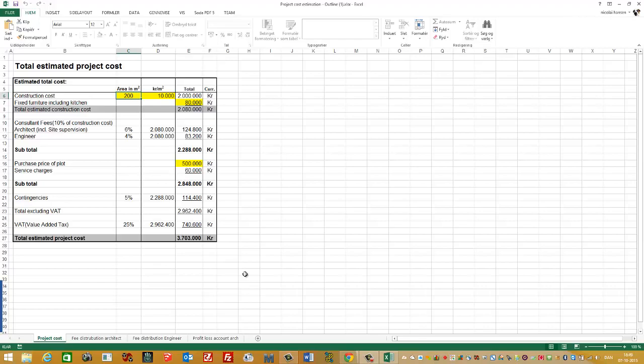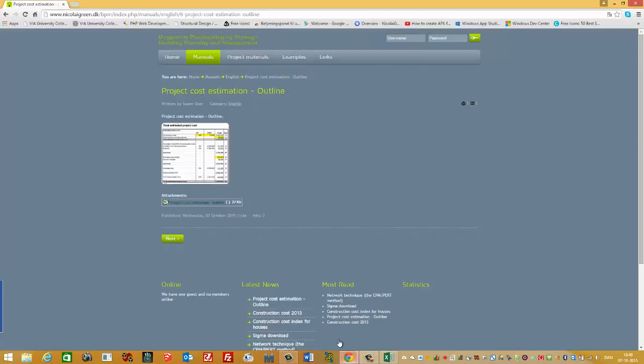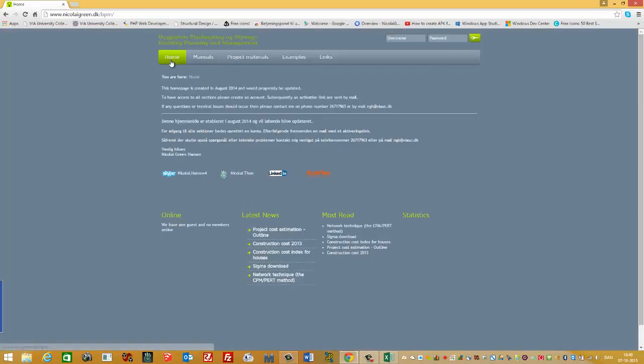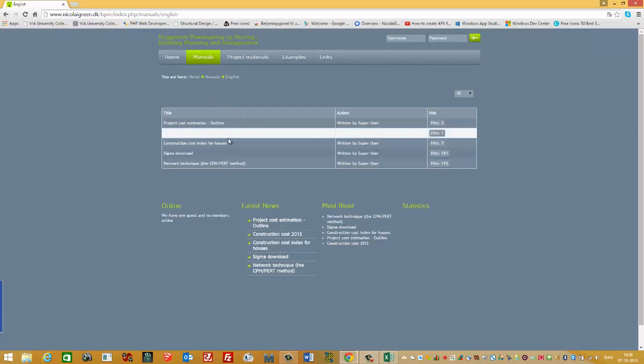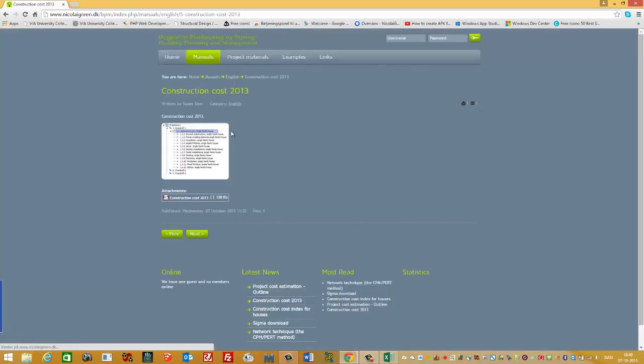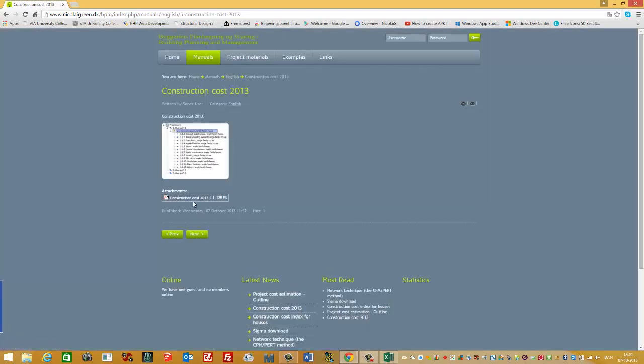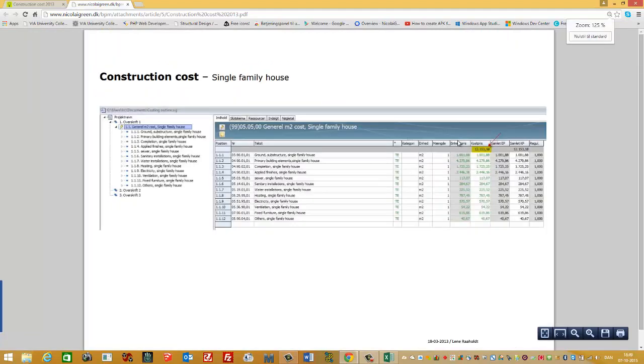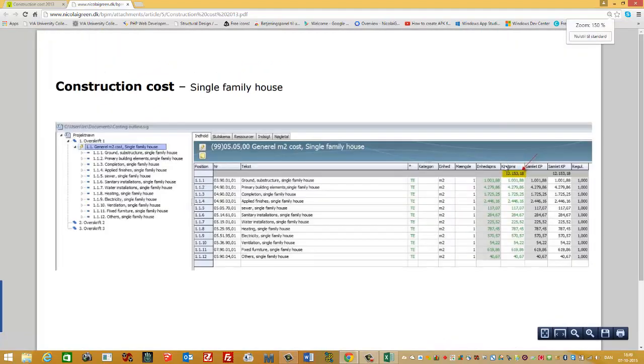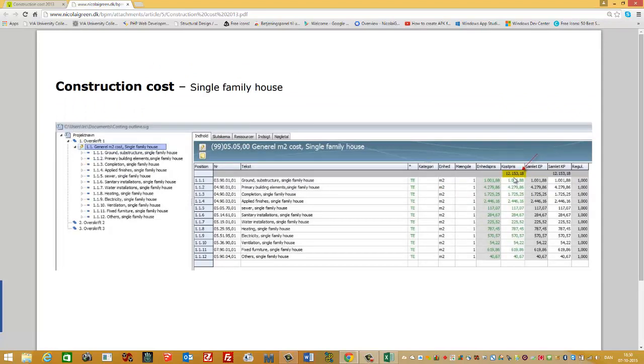Then I go to the website again, to Manuals, English. And here you can see it says Construction Cost 2013. It's a PDF file. Here you can see the price is 12,153 Kroner per square meter.